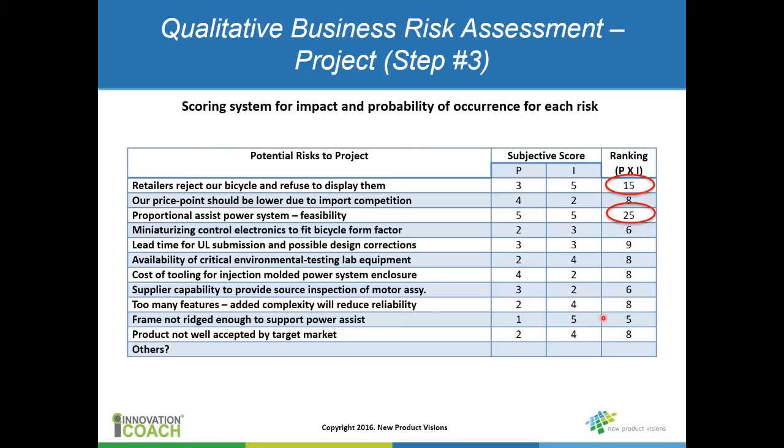And you'll note here that there might be some of the risks that are very high impact to the project, but very low likelihood that they will occur. So relative to the other risks, they're actually not that great. But I think sometimes, without doing this type of exercise, engineers especially would typically want to key in on high impact types of risks. But if it's just not that likely to occur, then you're probably wasting resources. It might be a good academic exercise, but there might be some other things that you really want to spend time on to begin with.